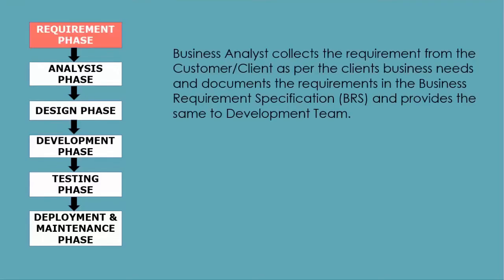First one, requirement phase. Requirement gathering and analysis is the most important phase in the software development lifecycle. The business analyst collects the requirements from the customer or client as per the client's business needs and documents them in the business requirement specification. The document name varies depending upon the organization. Some examples are Customer Requirement Specification (CRS), Business Specification (BS), Business Requirement Document, etc., and provides the same to the development team.